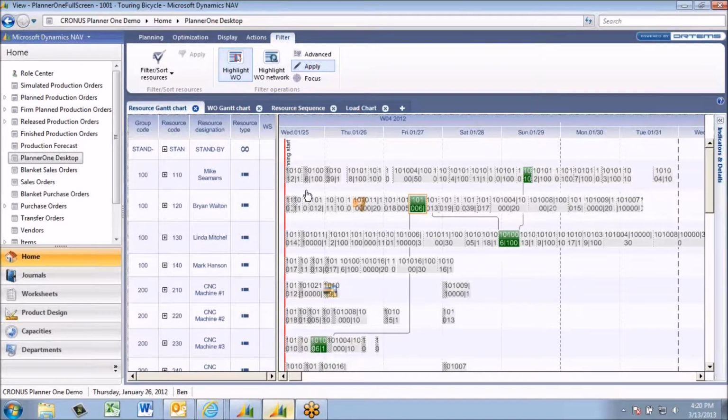So it's going to have some work done, it looks like towards the end of the day on Wednesday. Then on Friday, Brian's going to take over and do some work. And I'm showing a very simple example where it's very serial. This one happens, and later that one happens, and this one. I could have these all slammed together with an end-start type relationship, so that this one has to start as soon as this one ends. I don't have that. I have that this one has to finish before this one, but they don't have to start and end at the same time. I also could run things in parallel, so I could have this linked to one of these operations that both have to complete before this one starts. So I'm not showing those examples fully capable of that.